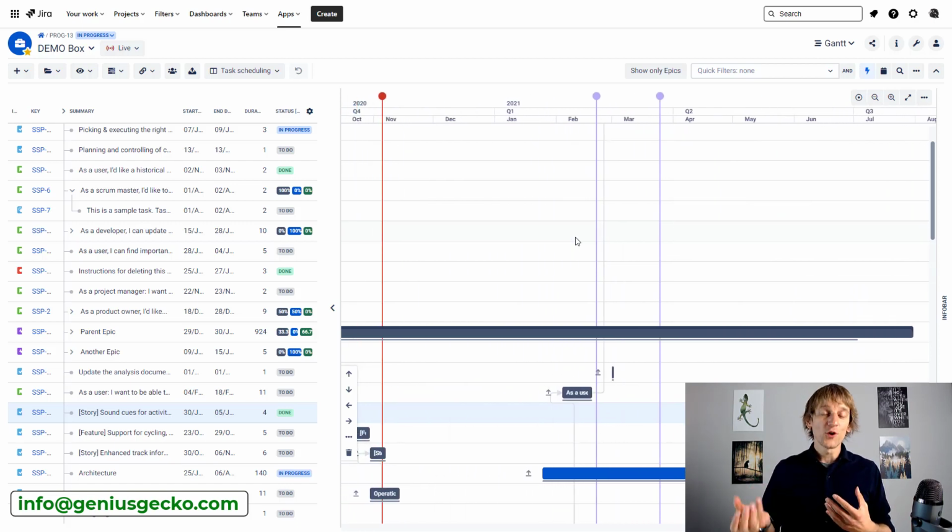So this was not possible before. Whenever you added a task or a Jira issue or anything else to the box or the Gantt view or the scope view in BigPicture, this element automatically got start and end date so that it is displayable on the Gantt chart, because otherwise it cannot be shown over here.